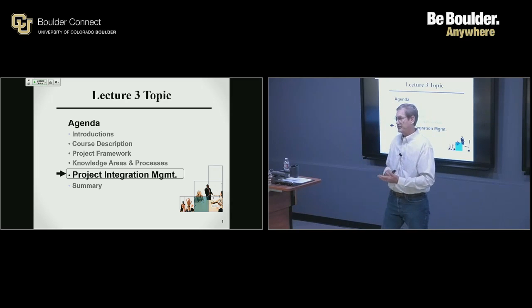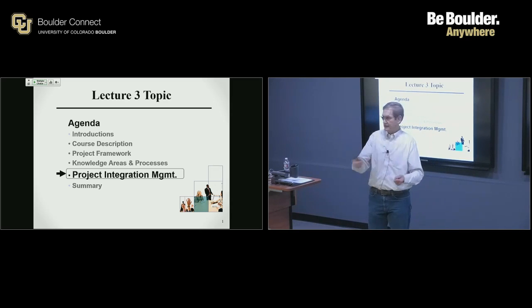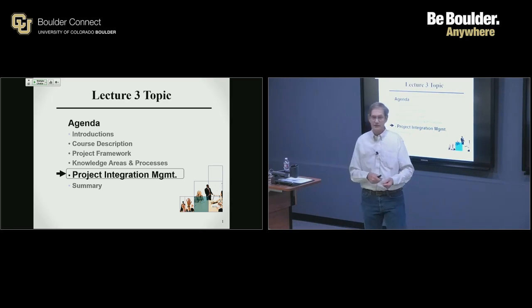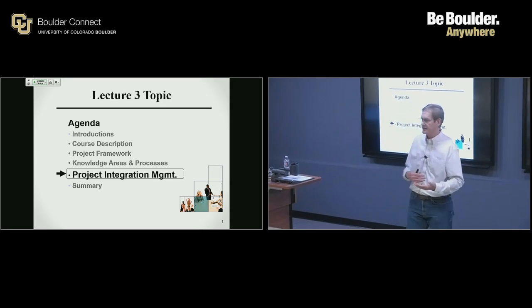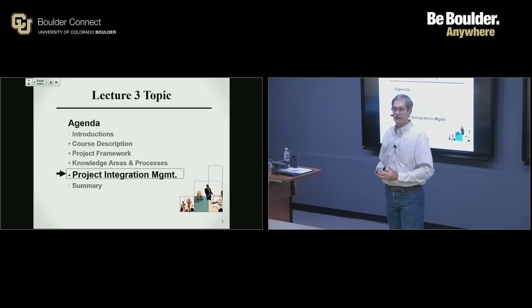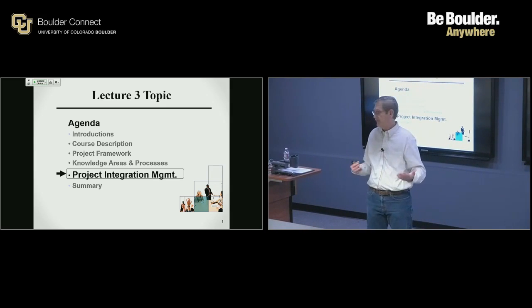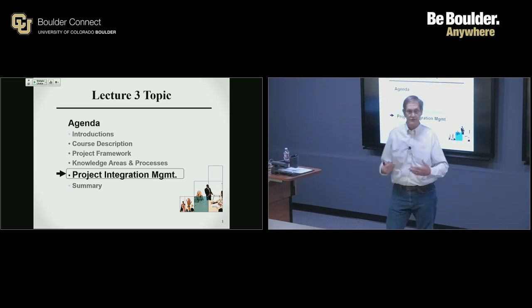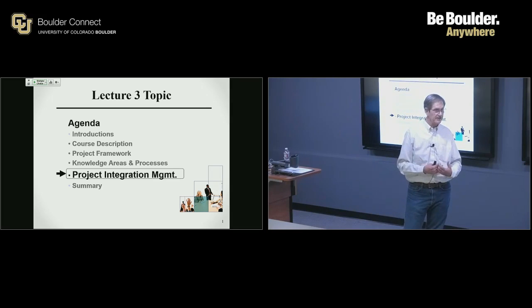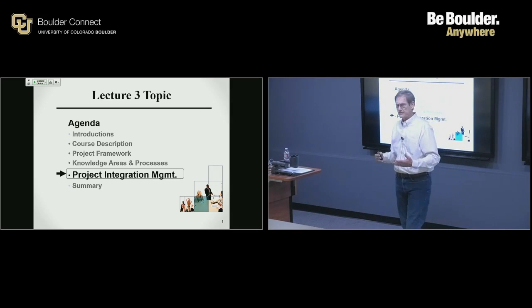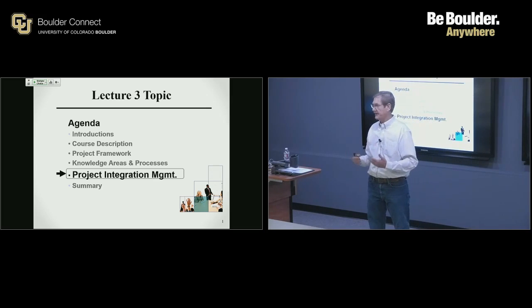As a project manager, I had claim codes that I could authorize different team members to use, and they would claim their hours against my project. We call it project accounting. And every week or whenever I wanted, I could run a report that told me how many hours were being charged against my project. So it's very important to understand cost management.